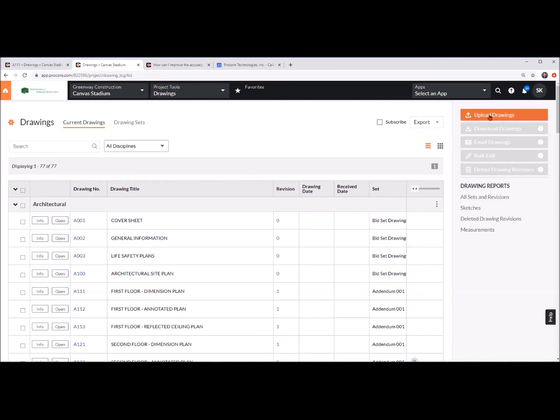When they go into that review state, before we get to that yellow banner where we can publish and distribute, the drawings are uploaded to Procore but not published for our external collaborators. Within that state, we can do our constructability review. As long as you're an admin level user, you can do your markups, and other admin level users, maybe internal team members, can go in there and do markups as well. That's something I wanted to share for anybody working in pre-construction or doing constructability reviews.